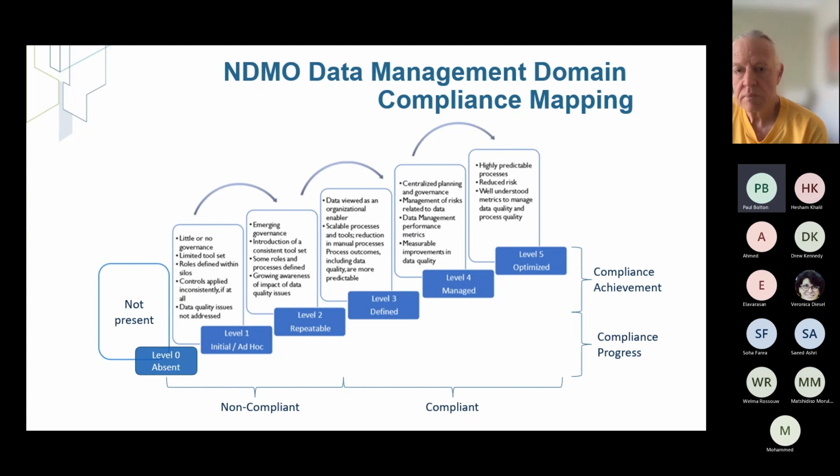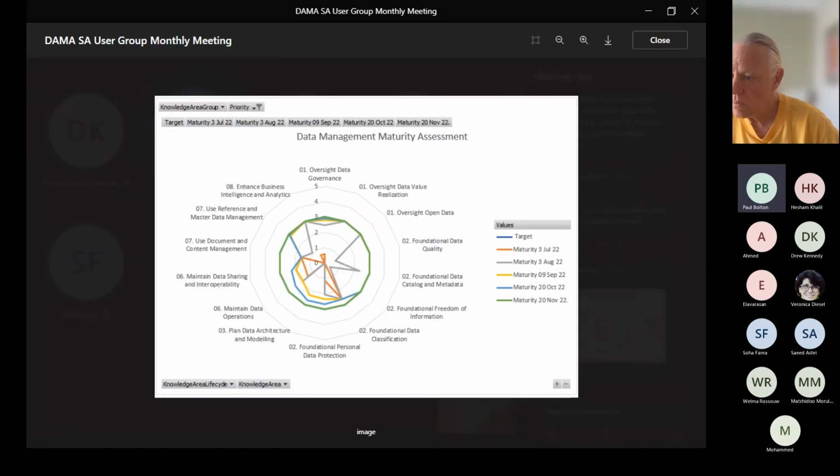So you can see here in the image that I've dropped there, the target is set at 3, and we basically want to move from the start of the project through to the end of the project. Are we achieving? This is for P1 submission, so you can see we achieved the goals there. And we did that just about every month. This was in line with our project milestones, so we lined that up according to project milestones.